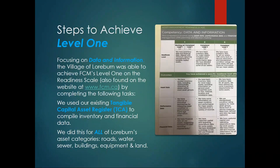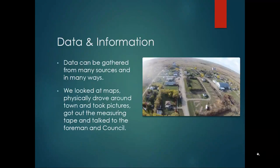We used our existing tangible capital asset register to compile inventory and financial data for all of Lorburn's asset categories: roads, water, sewer, buildings, equipment, and land. Data can be gathered from many sources and in many ways. We are quite small — 106 people, about 120 kilometers southwest of Saskatoon. We went and looked at maps, physically drove around our village, took pictures, got out the measuring tape, talked to council, and compiled all that information into Excel spreadsheets.